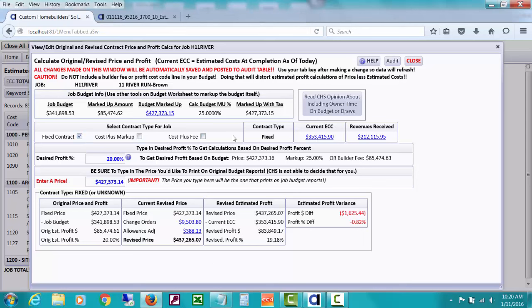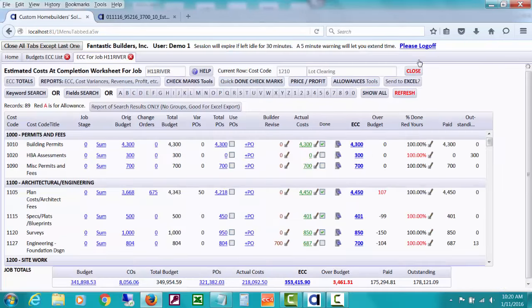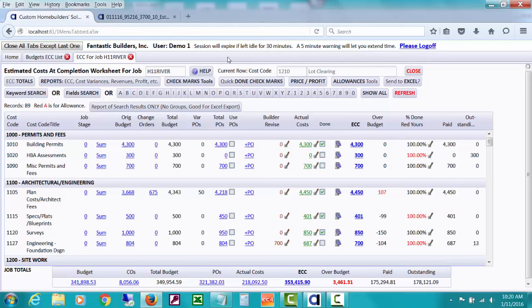And if your costs are heading over your budget and you haven't done change orders or they're not allowances, you might start going down a little and want to decide, oh, I need to make up some costs somewhere else because I'm starting to head over. So that's a real good clue for that. And I really like to point this window out and show you how much CHS is reacting to the estimated cost at completion and giving you some good analysis information.